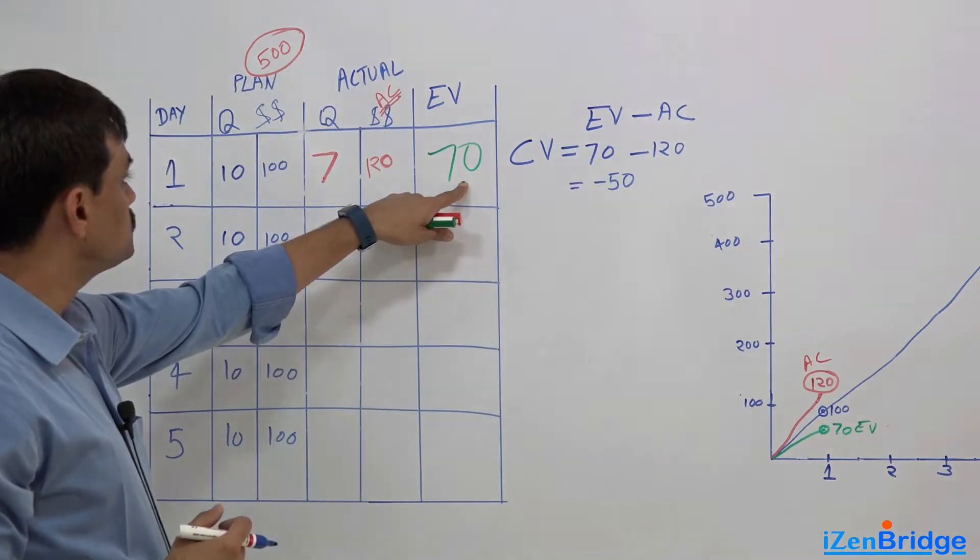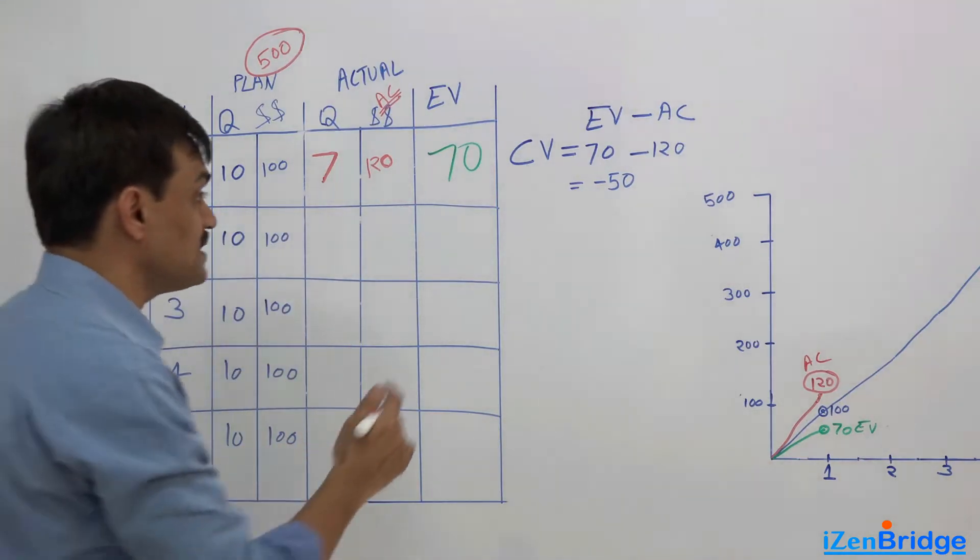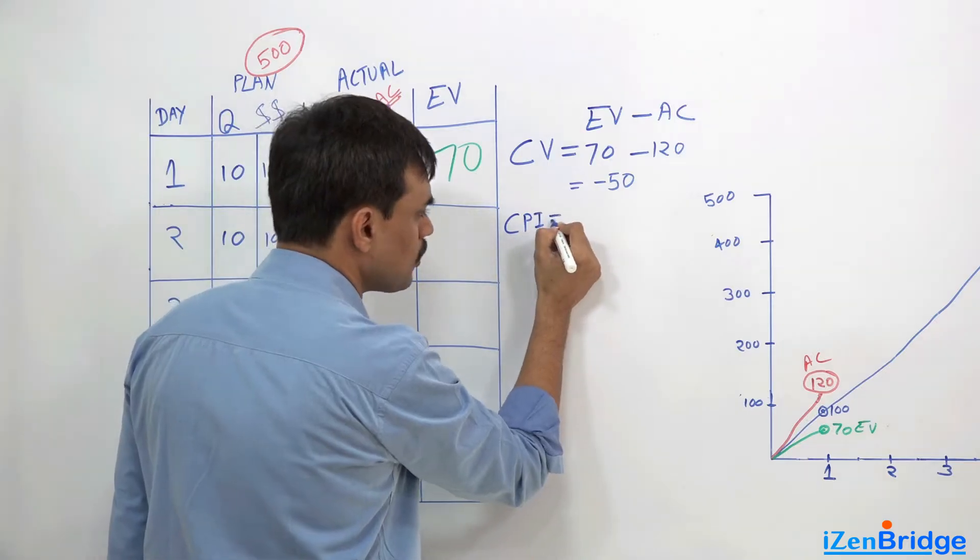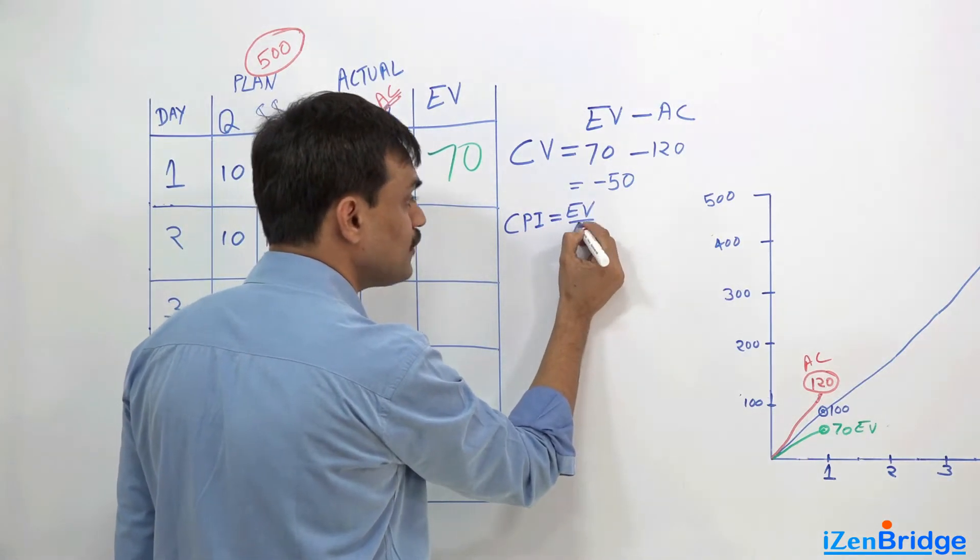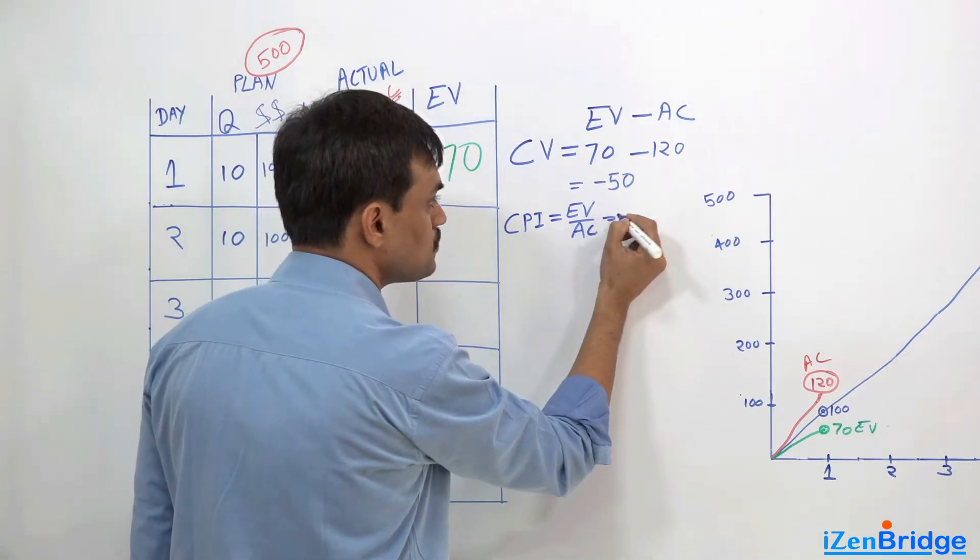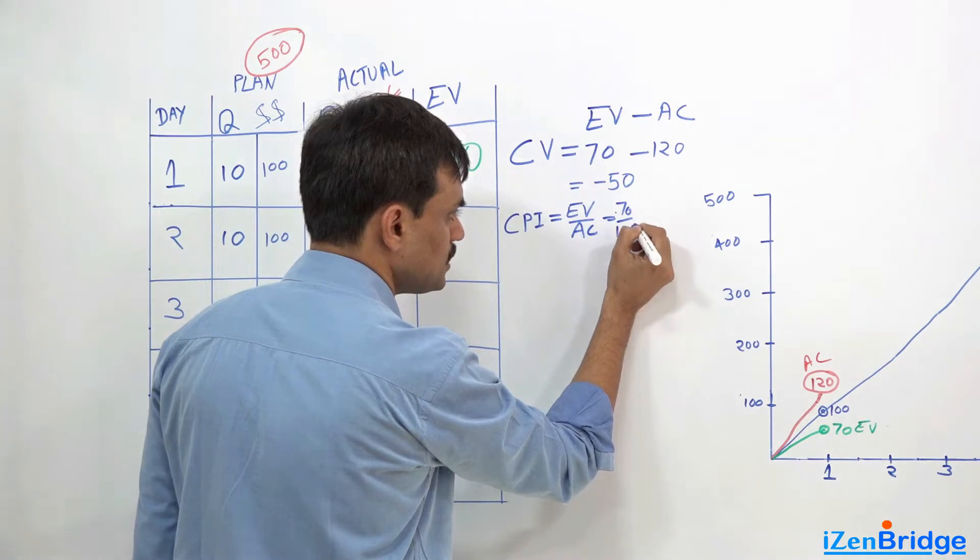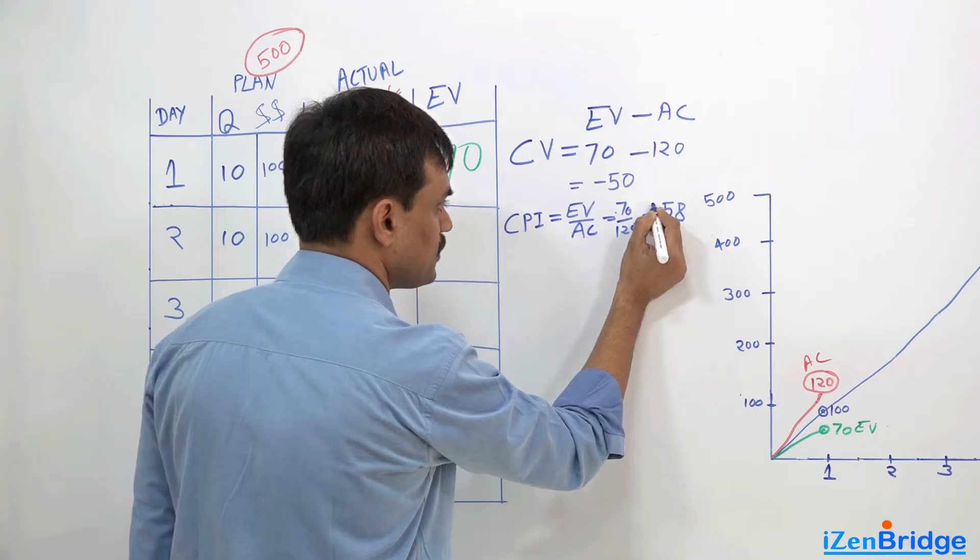Earned value minus actual cost. And we also have something called cost performance index, we call it CPI, which is also representing the information in a different way - earned value divided by actual cost, which means 70 divided by 120 comes near to 0.58.